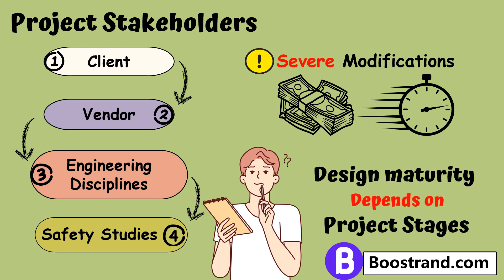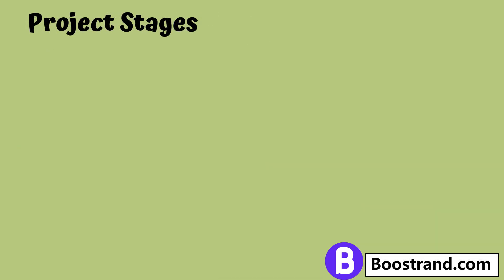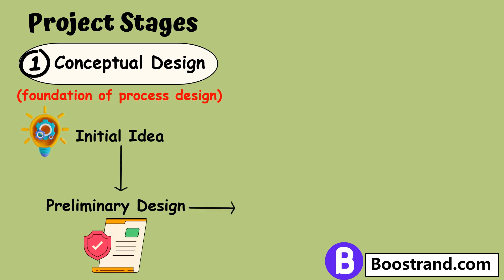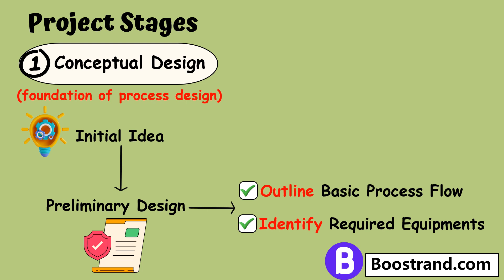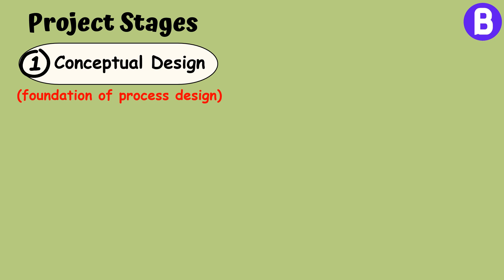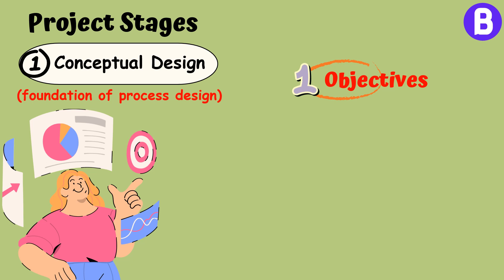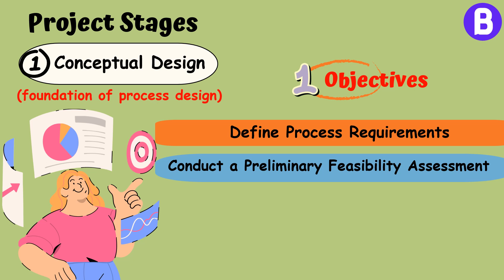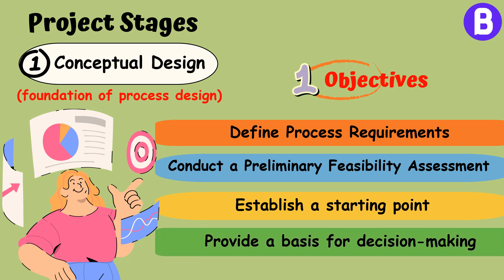The maturity of process design depends on the project stage. The first step in any process design journey is the conceptual design stage, which serves as the foundation for the entire project. It involves transforming the project's initial idea into a preliminary design that outlines the basic process flow and identifies the major equipment required. The objectives of this stage include defining process requirements such as production capacity, product specifications, and environmental constraints through process simulation, conducting a preliminary feasibility assessment, establishing a starting point for subsequent design stages, and providing a basis for decision making on whether to proceed with the project.